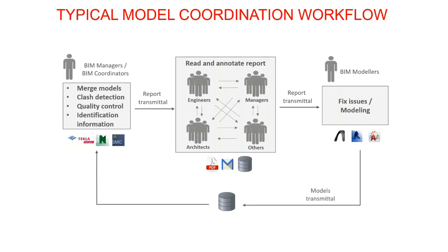Finally, the modelers are returning the models to the data sharing environment with a lack of information on issues. They have to annotate the report if they want to communicate back the action they did. Because different versions of the same information can coexist in different mailboxes and locations, it's obvious that information might be lost or produced twice in this process and lead to late schedule or cost overrun.